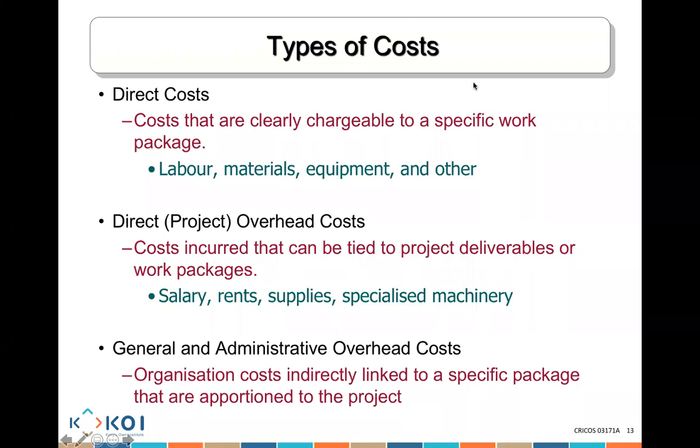There are also what we call overhead costs. What are they? In every project, you're going to have someone called the project manager. That project manager needs a wage. He's not doing the task, but his work is tied to some project deliverables. His guidance and his experience enable us to get the project completed. What about the rent? They need to rent space to sit in and get the job done. They need specialized machinery, whatever they need. It's really costs incurred that can be tied to a project deliverable or to a work package.